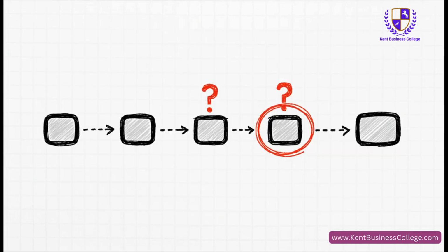So, bad smell number 1: open ends. What's an open end? It's an activity that's missing a link. It's got nothing leading into it or nothing coming out of it. It's just stopping. It's a break in your railway line, and it means your critical path calculation is completely broken. Now, the only, and I mean only, open ends you're allowed are the official start of the project and the official finish. That's it, no exceptions.